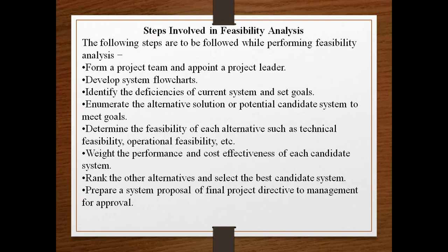Then you're going to rank the alternatives, and again you're going to select the best candidate system. You're going to prepare a system proposal of the final project directive to the management for approval. So these are the steps of feasibility analysis.